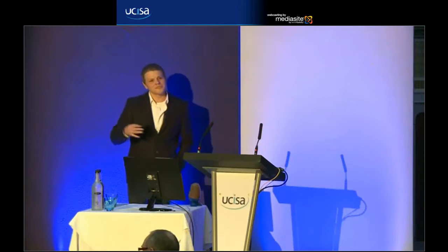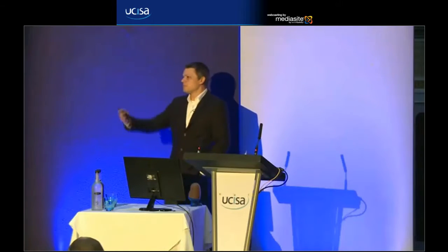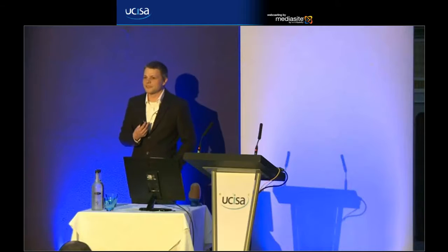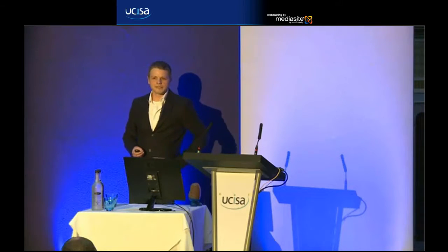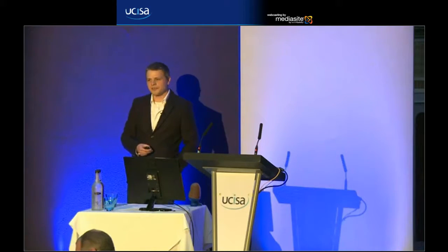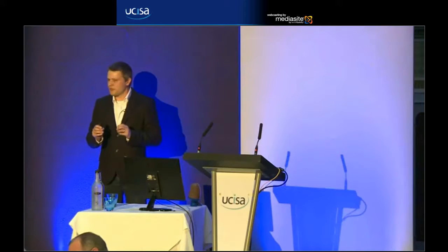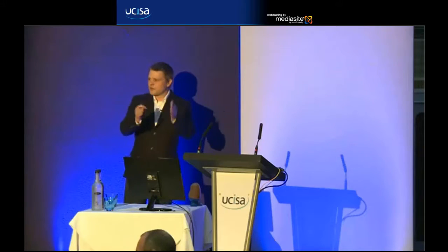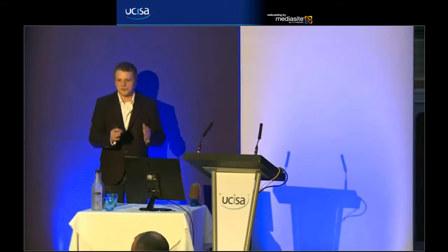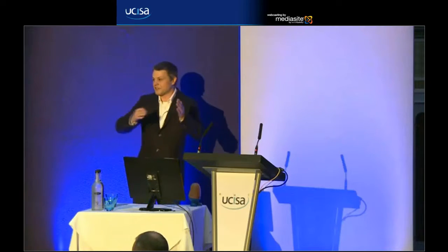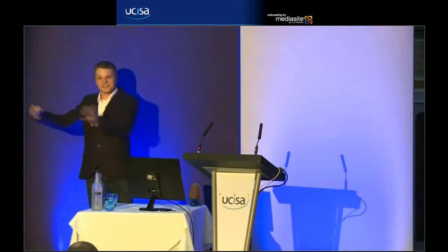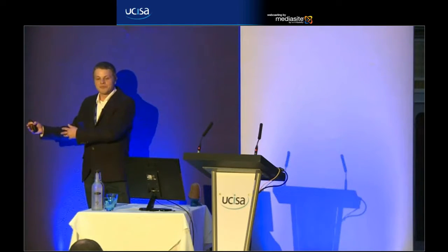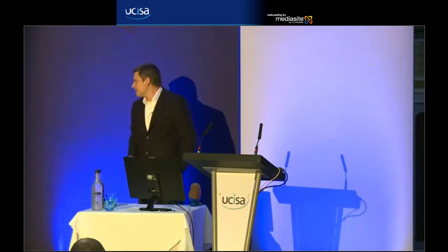Estimation: no consistent real method for estimation. You know, come to me, I'm the lead person in the team, I've got experience and knowledge, and they'll say, how long do you think this will take? And I'll go, yeah, I think that'll take 3 weeks, just based on experience. And so all these dates and times that you put in go into your big Gantt chart, and each one of your boxes on your Gantt chart has an error associated with it because they're not going to be accurate, so that by the time you get to the end of the Gantt chart, all these errors have accumulated up, and you're not running to the time that you ever thought you were going to at all.